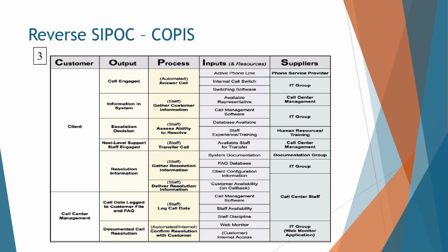You get the point. When you work on your Lean Six Sigma project, I highly recommend that you don't do a reverse SIPOC. No reason to get fancy here. I would start with suppliers. What are the suppliers going in? What are the inputs? What are the process steps? What are the outputs? And who is your customer? Keep it very clean. Keep it simple.